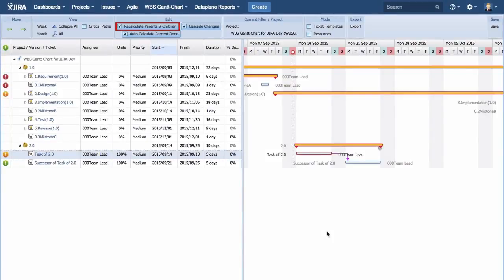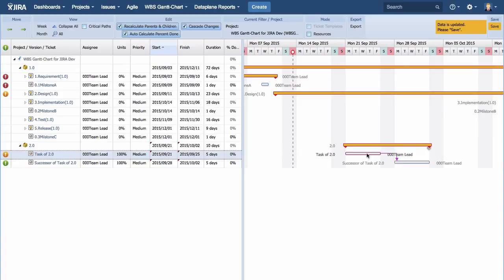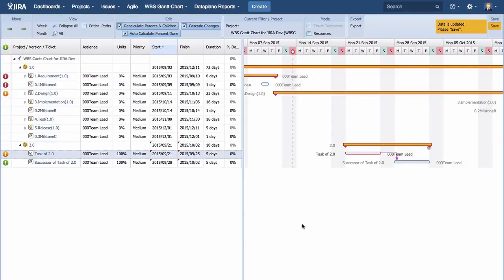Make sure the box of Recalculate Parents and Children is checked. In the case of a ticket with dependency, when you move the predecessor ticket, the successor ticket also moves together.